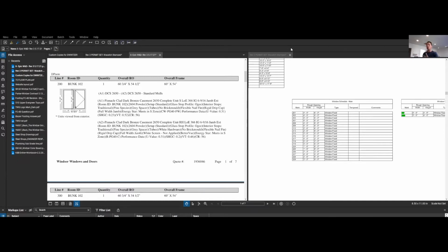Today, I wanted to go over what I'm currently going over in the job, which is ordering windows. I got a phone call on Friday last week from my window guy that windows were about a 6 to 8 week lead time. And we knew that at the end of the month, they were going to go up 4%. So luckily, that 8-week lead time was exactly when we could order them before that 4% price increase went up.